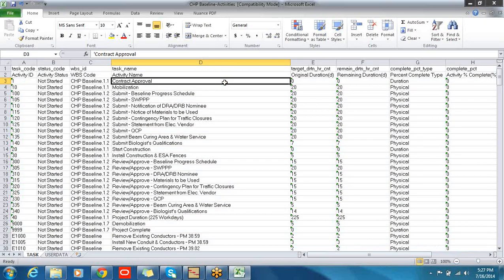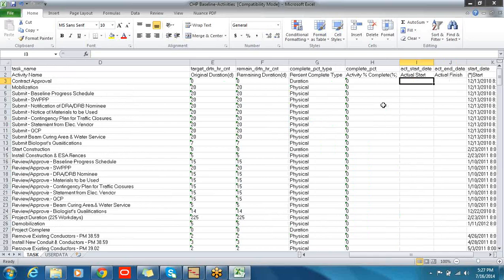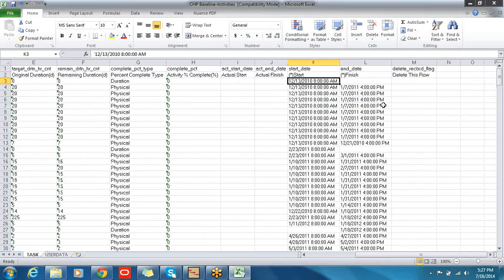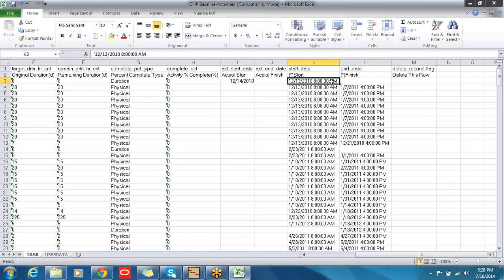My first line is actually the contract start, contract approval. It's a duration percent complete. For this activity, I need to give it an actual start date. You might also notice this is why I wanted to be able to see what the planned start date was. It's an older file, but the concept is the same — as you're filling in actual dates, it's nice to have the reference of what the dates should be. I'm going to say we started one day late. The way I'm typing this is very deliberate: you must mimic the date format that's in the actual start and actual finish columns. You do not need to type the time of day, but the other part must be correct. This is a milestone, so there is no finish date — I do not need to fill that out.